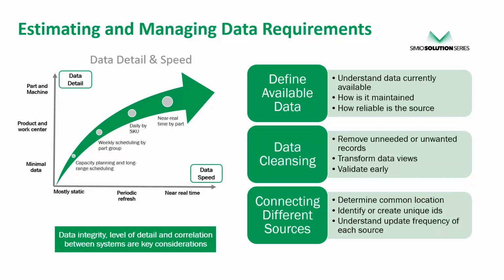Because from my experience with getting into projects, large complex data can be the place where the estimate for time is generally always off. It seems to always take longer when you're dealing with complex data than it seems it's going to take. And of course, that ranges from project to project, but I've found that it comes down to these three pieces here that dictate what really consumes the most time when considering data in a large project. And that first one is really just having an understanding of what data you have available.